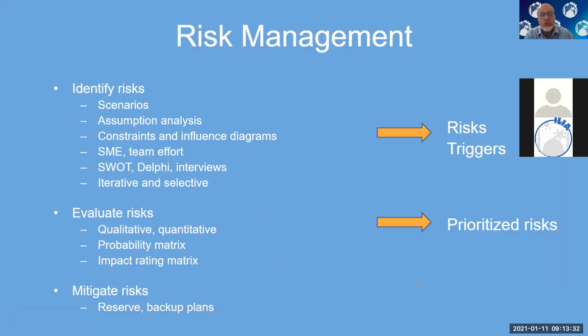Like I was just sharing, you come up with what-if scenarios, you do assumptions, you analyze your assumptions. Remember back early in the day when you wrote your charter and your scope statement, you had some assumptions to come up with those statements. You're going to go throughout the project and continue to validate these assumptions. Are they still valid? If you feel they're still valid, then your levels of risk are contained. But if the assumptions change, you need to go back to your plans and update them accordingly. You might have some constraints that you want to update, or diagrams showing certain triggers and things like that.